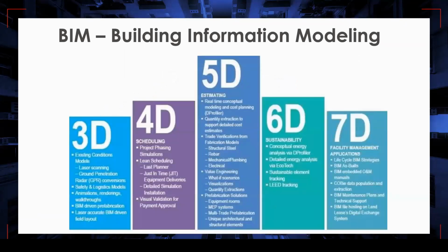Also, BIM has dimensions. 3D is where you develop the 3D BIM model, the 3D design of the model. Generally, in project consulting, design consultants develop the 3D design, and you can use this 3D BIM model directly for your field layout. You don't need to create the design with 2D drawings in AutoCAD and then convert the drawings into 3D. You can have the 3D BIM model directly, and within minutes, you can convert this model into field layouts.